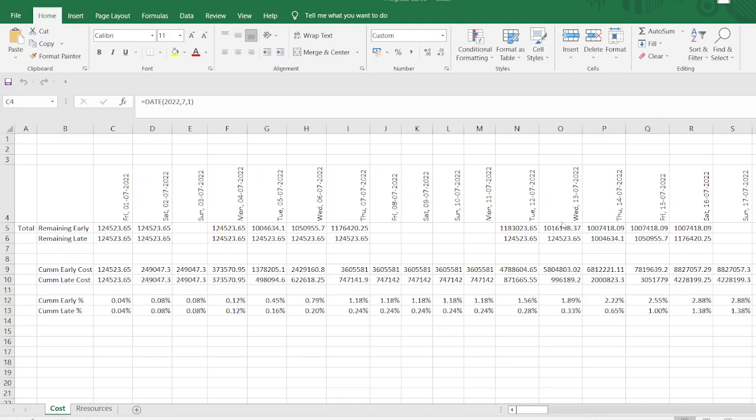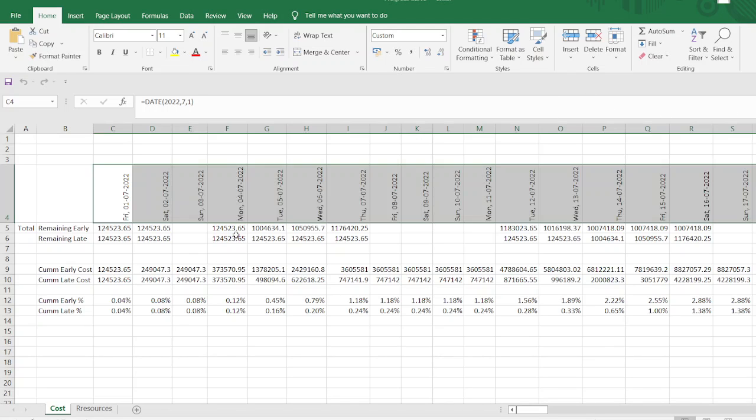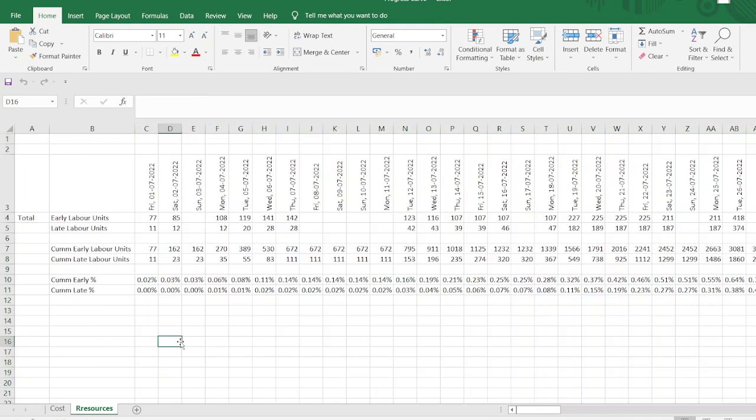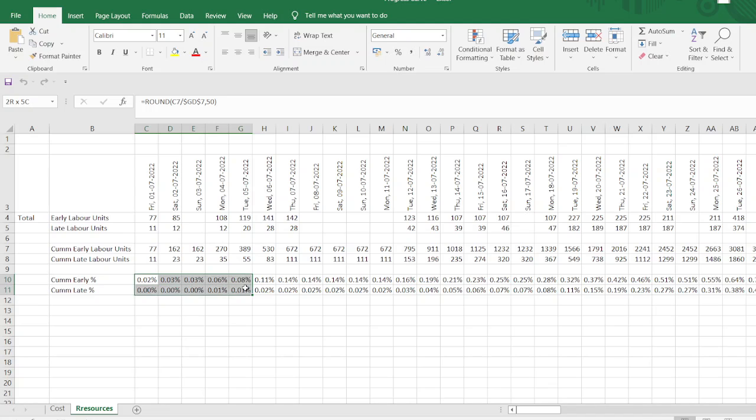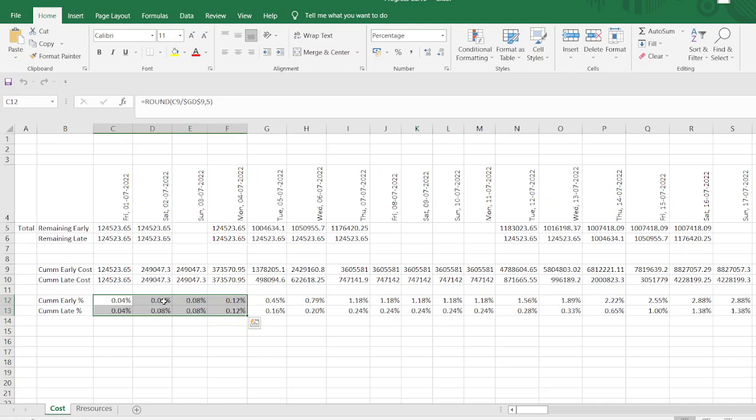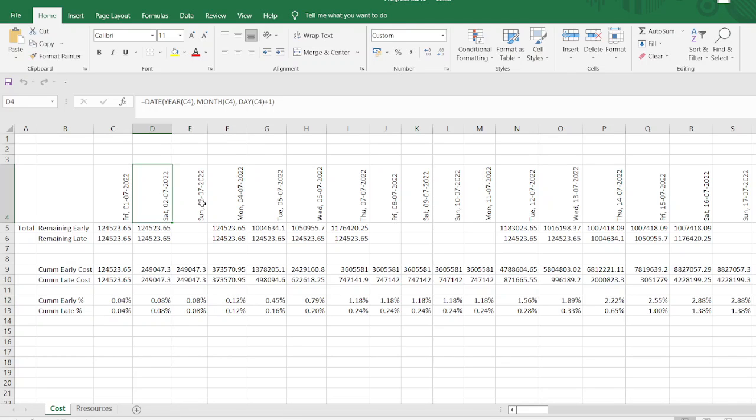So this is the values we are getting from our previous two videos. And this is based on the cost and this is based on the resources. Here we see that we calculated, we computed the percentage, cumulative early and late percentages for both cost and resources. Here you see that we have some formulas here. And even in the days we have some formulas here.